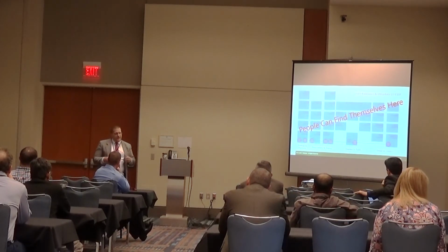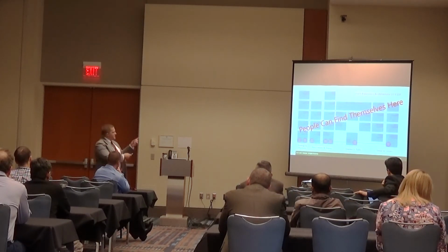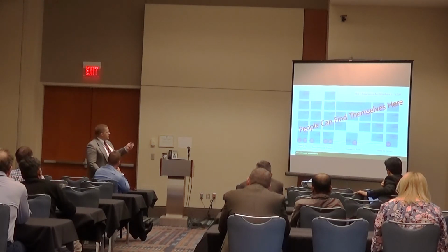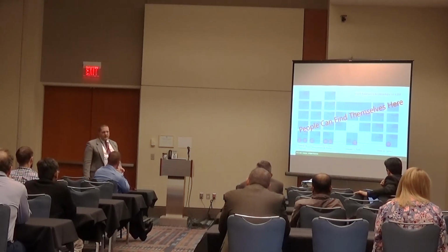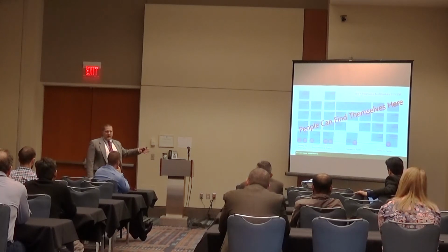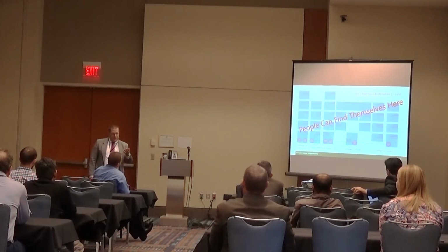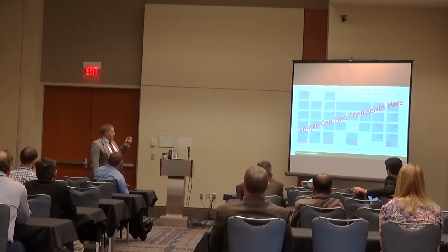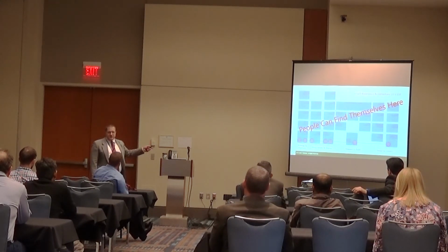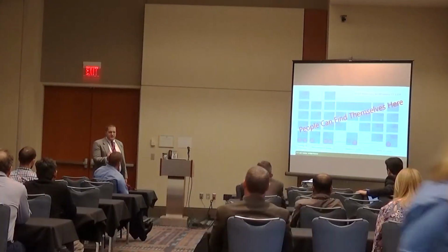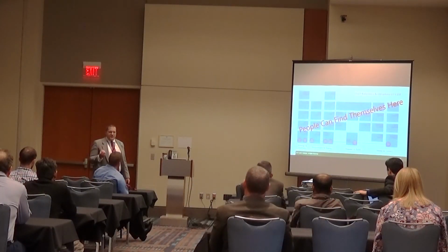So this is where the bimodal conversation comes in. You might choose to do your requirement to deployment processes differently for e-commerce, where you bring in a lot more agile and DevOps and try to drive a lot more agility and speed into it. And you may stay more waterfall in your processes if you're in the supply chain division. Now, neither one of those changes fundamentally the work that has to be done, the application that's needed to support that, or the data that needs to flow from parts of the organization to effectively do IT.